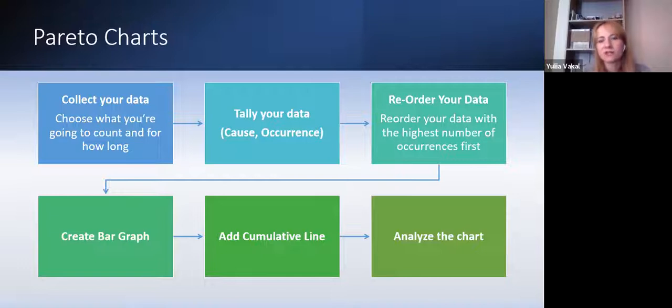Then you tally your data to present it in a nice way. Then reorder your data, starting with the highest number of occurrences first, then build the chart, add the cumulative line, and analyze the chart.